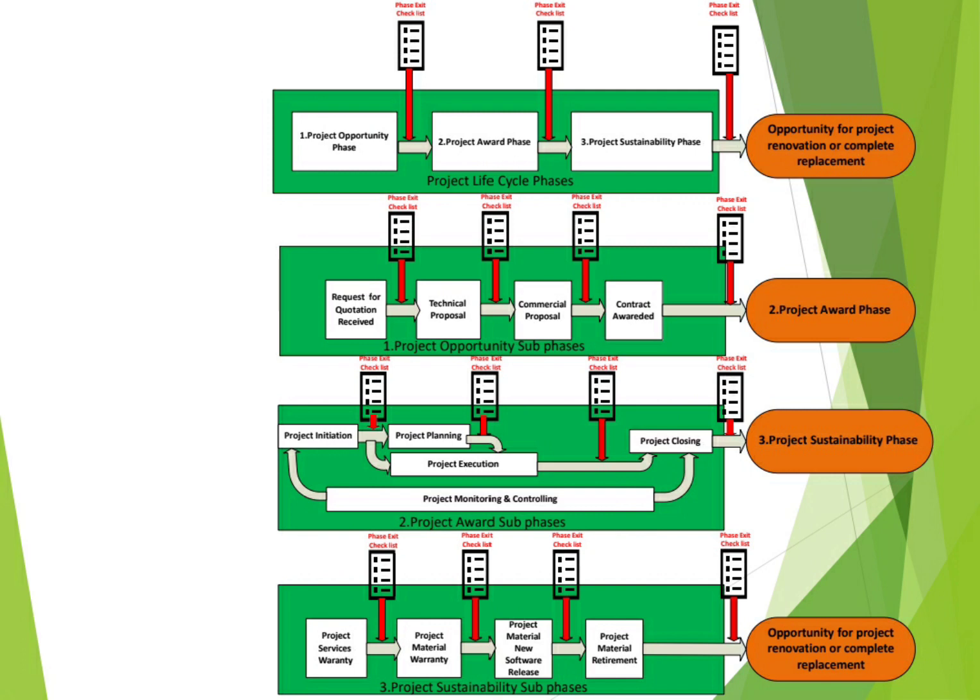Also, you need to check the validity of the bank guarantees. If you fulfilled all the requirements of the contract, you need to request your customer to return the original bank guarantees. You need to check if there is any training scope, so that you need to conduct any site training.